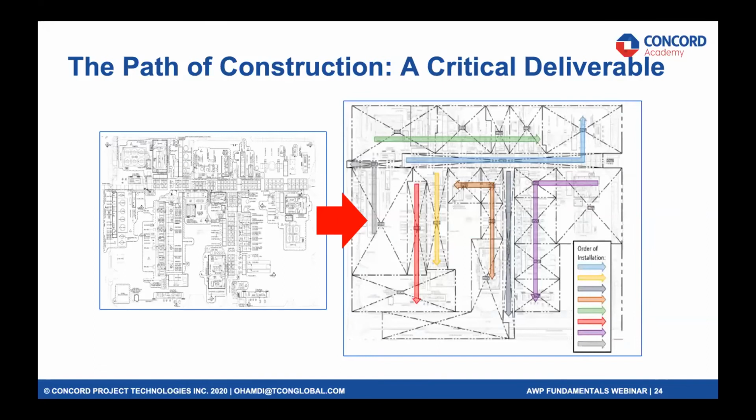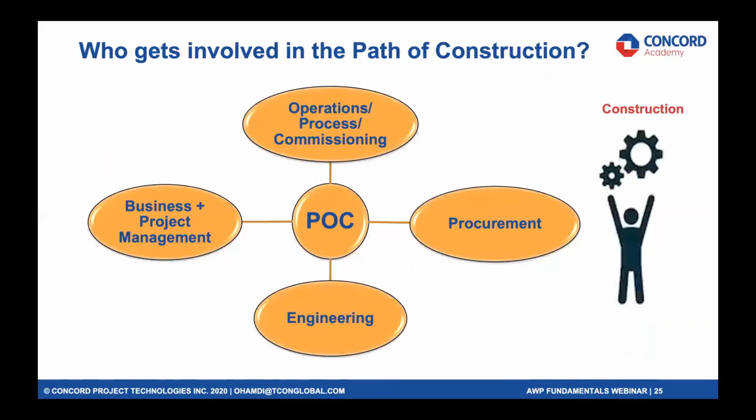So here's a visual of a component of the path of construction and its breakdown of areas, where you take your plot plan and divide it into those areas, taking into consideration your logic of construction and even the order and sequence of installation.